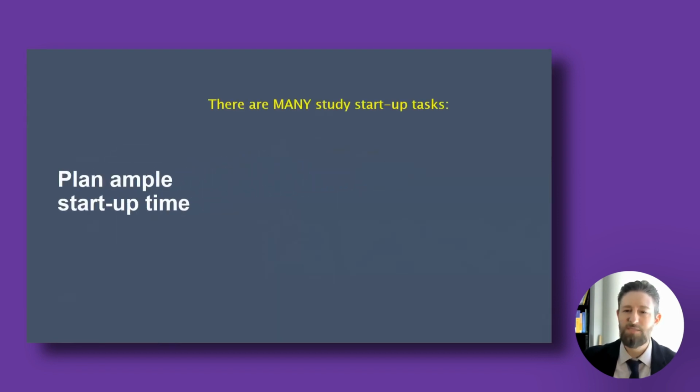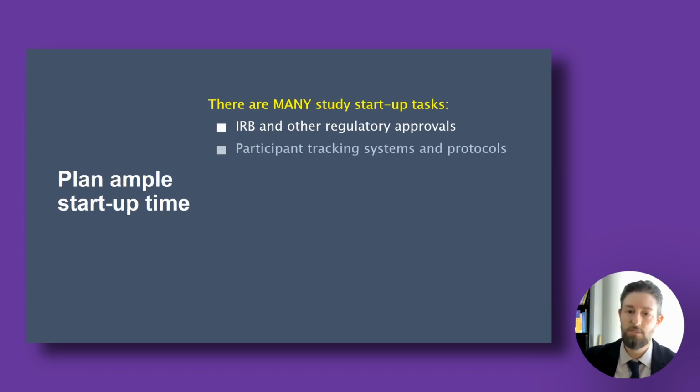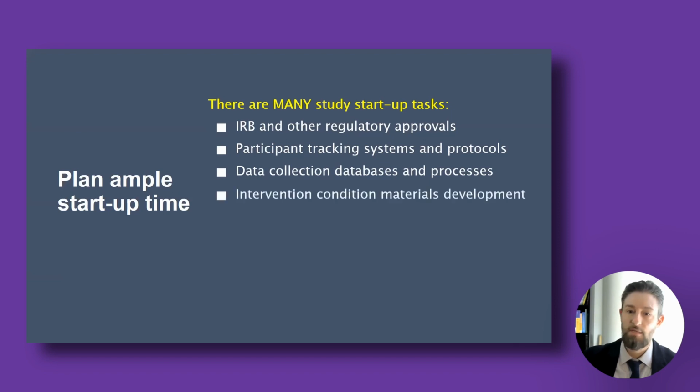And it's because there's just a lot of study tasks to get in order. There's a lot of IRB and regulatory approvals. Many IRBs haven't seen these types of trial designs, and it just takes a minute to get them oriented to how this type of trial design works. There's also participant tracking systems and protocols that need to be developed and fully fleshed out, and those can take a while to put together. Data collection databases and processes, intervention condition materials development.